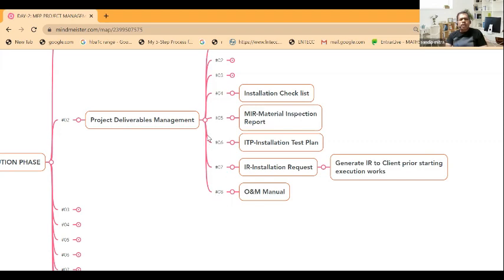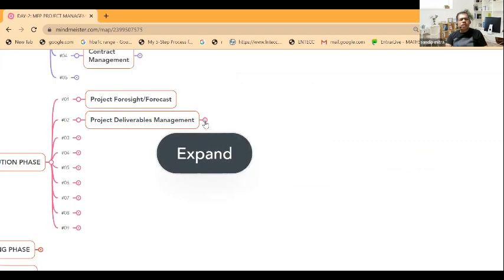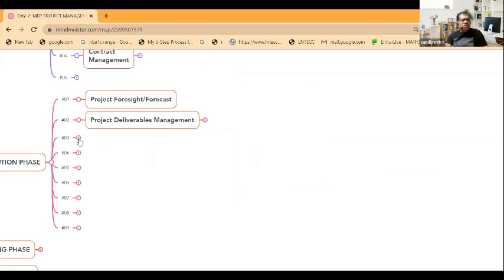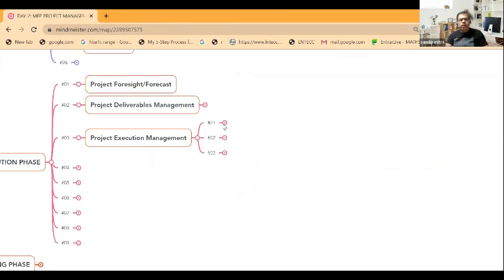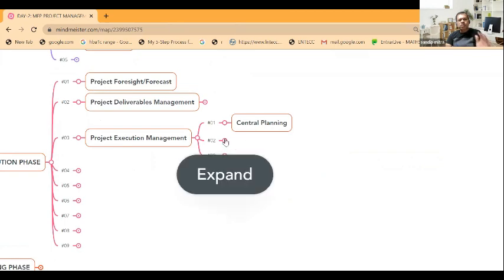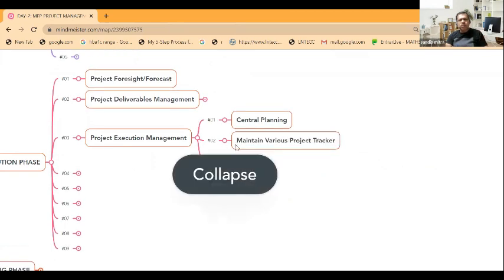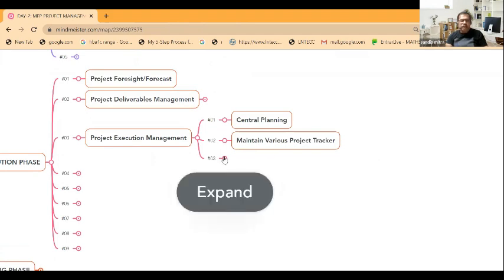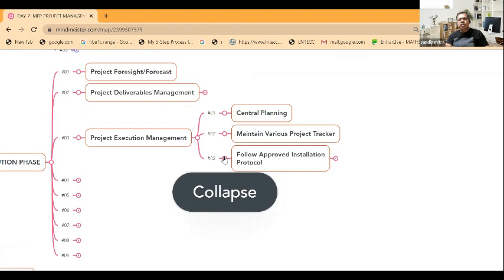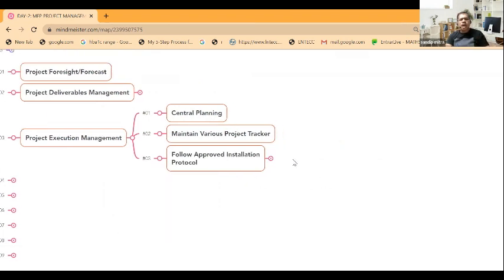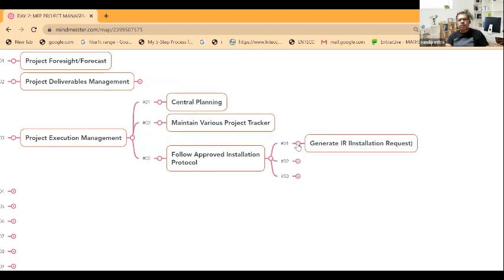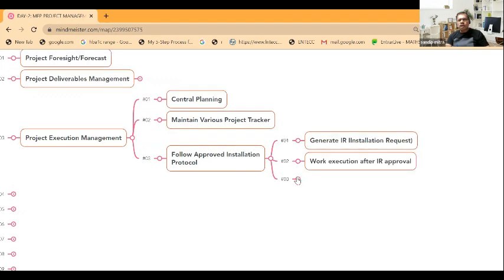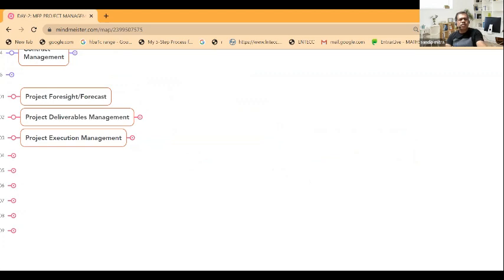There are other more documents - the testing commissioning plan, O&M plan, snagging plan. I'm not going to go through everything - this is huge - but at least you understand the basics. Project execution management - there is a central planning team, as I already told you, that maintains the various project tracker. Maintain the project tracker, follow the approved installation protocol. The work execution happens after IR approval and installation checklist is reviewed by the approved authority. These are part of the project execution management.